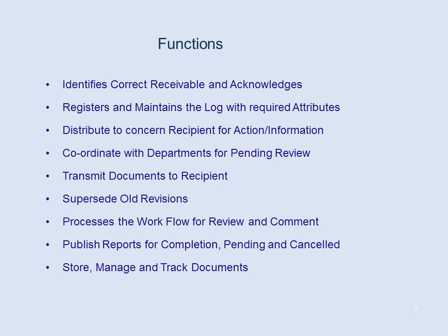Registers and maintains the log with the required attributes. He has to maintain the register where all attributes like document type, document number, client name, status and revisions etc. are logged. And this log helps to track the documents in the whole process, from creation of documents to delivering to the client.